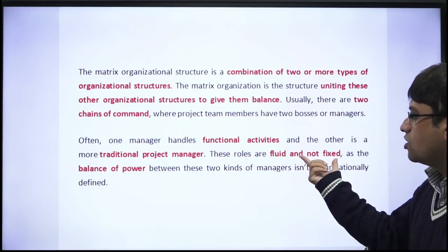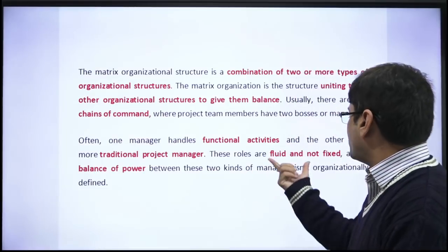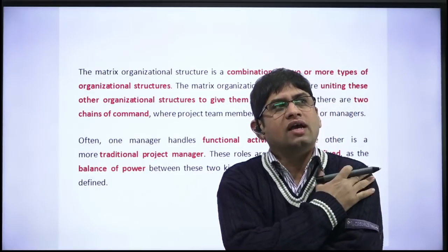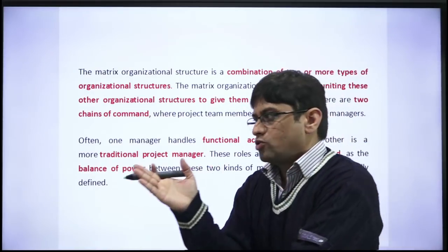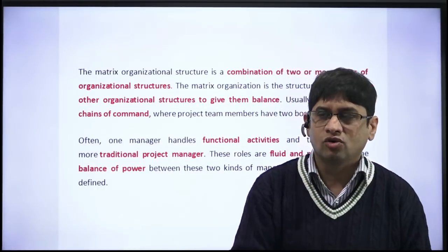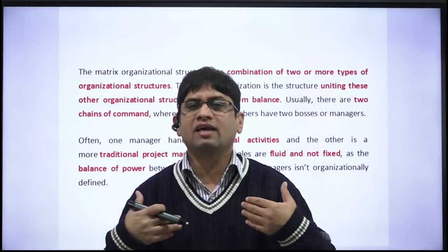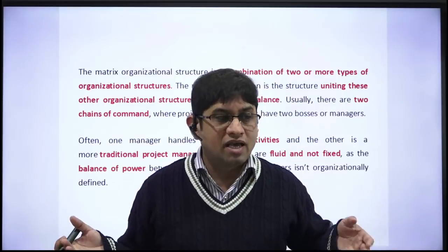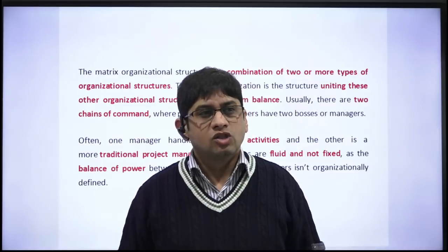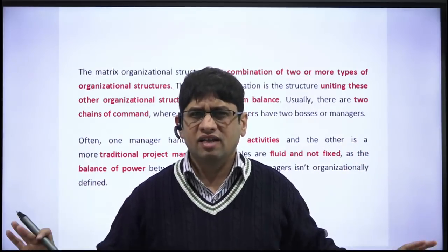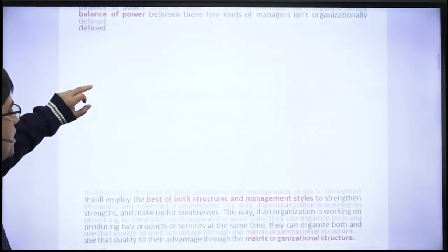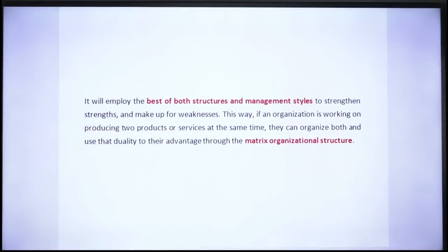The balance of power between the two managers is not organizationally defined. As an employee, if I report to the project manager and also to the sales manager, and both give me work to complete on the same day, there will always be a tussle. Interpersonal troubles always arise because the roles are not clearly defined. This remains one of the main causes of trouble in matrix organizational structures.